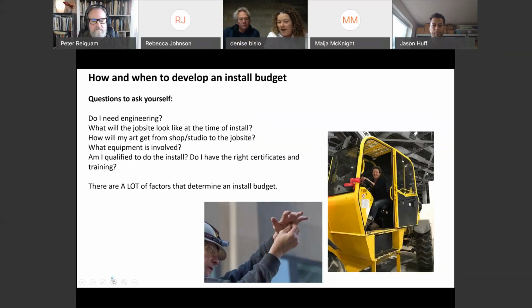So how and when does one develop an installation budget? Some common questions just to kick it off, these are the questions that you would ask yourself. Do I need engineering? What will the job site look like at the time of install? How will my art get from the shop to the job site? What equipment is involved? Am I qualified to do the install? Do I have the right certificates and training? There are a lot of factors that determine an installation budget.